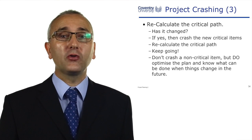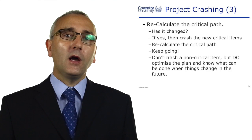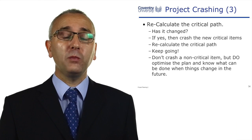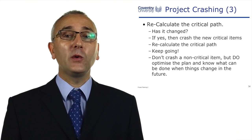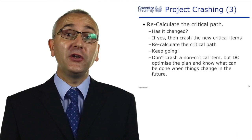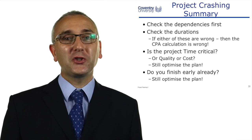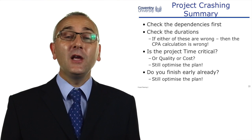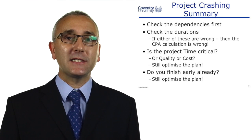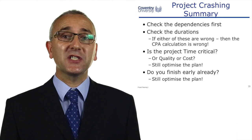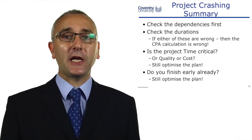Lock says don't crash a non-critical item — it doesn't give you any benefit. What I suggest is that we optimize the whole plan such that if we do change the critical path, we're already working on a new optimized critical path. In summary: check that you've got the correct durations and dependencies in your network analysis. The durations are just estimates — when people's priorities change, their durations change.